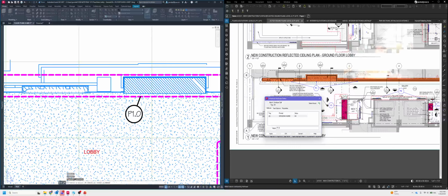Something important here is that with these print references, although I use P1 for the PDF version, you want to put P1.0 here, which actually doesn't matter right now, but later on it will actually make a really big difference when you get to linking your submittal at the very end. So for now, you want to put the .0 at the end.